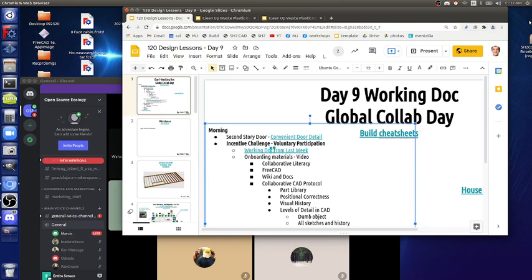Now, I think the block is, and that's my fault, we don't have the actual finished complete CAD at the level of detail that we need for the build. But if we focus on that and accelerate it, we'll get that full digital model. Otherwise, whenever we're in the workshop, it's going to be, oh, now we have to figure out this little detail, and there's too many things to keep track of. So we need that full CAD model to accelerate the progress in the shop.